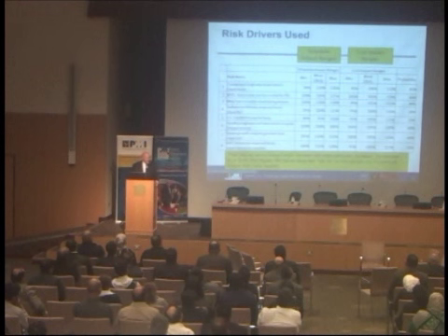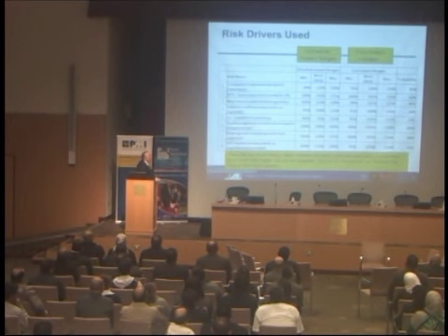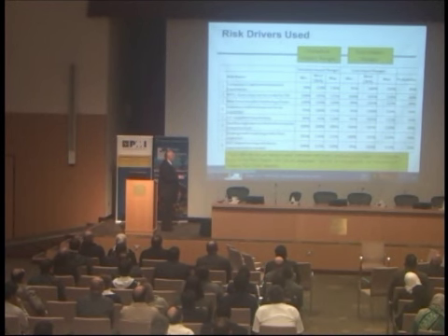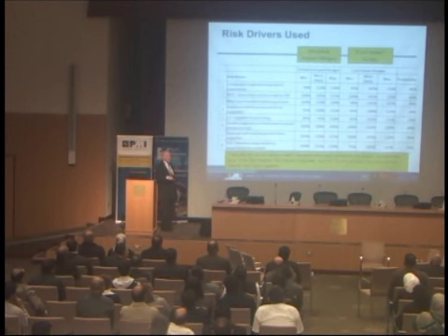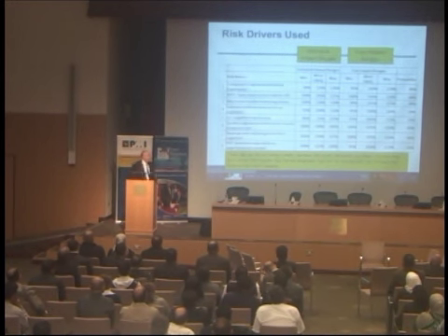Okay, now we're going to put it on the regular risks, the risk events. We're going to use risk drivers. These are the schedule uncertainties, and you don't have to know, but there are 8 of them. These are the cost uncertainties, and if they're applied to a time-dependent resource, they will affect the burn rate. If they're applied to an activity with time-independent resources, they'll affect the total cost. In Polaris, you can front-end load it or back-end load it if you want. Here's the probability over here. Okay, now we're going to apply it to various activities.